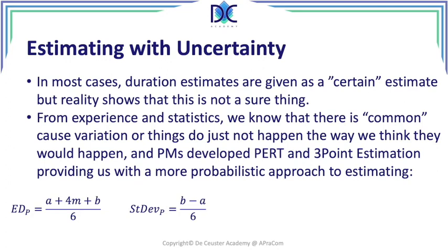That's one way to do the calculations, but over the years they also found that in case you're not really sure about the distribution, you have some doubt about this, you can use a different probability function, and that probability function is a triangular function, a probability density function. And in that case, the elements, the calculations, the formulas are a little bit simpler, and we call them the 3-point estimation.